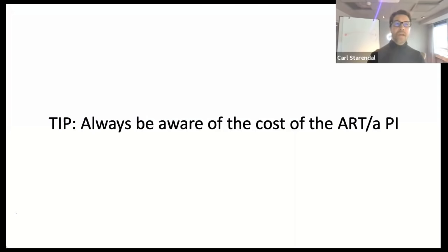And another one, this is sort of my sneaky tip, this is my practical little thing. If I'm with an ART, I always want to understand how much does a PI cost this organization? And I'm talking kroner or dollars here, I'm talking about the money. I want to understand 10 weeks of work for 200 engineers, sort of salaries, technology, equipment, and I want to know, is it millions or billions? Say that it's sort of, maybe 10 million. That's what it costs a PI.